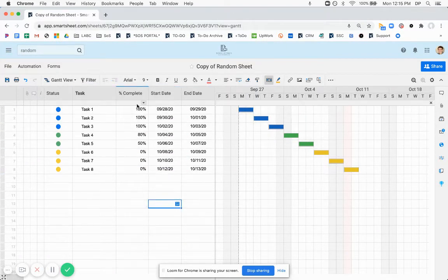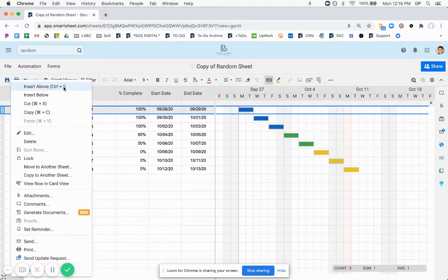So in this scenario, we can see the percent complete for our individual tasks, but not for, say, the entire project. Or if you had multiple phases where each phase has a subgroup of tasks, you might want to see that as well. So the first way you can do this is to add hierarchy and to reference the child rows of any particular parent row. I'll show this on the project level and the phase level, two levels of hierarchy.